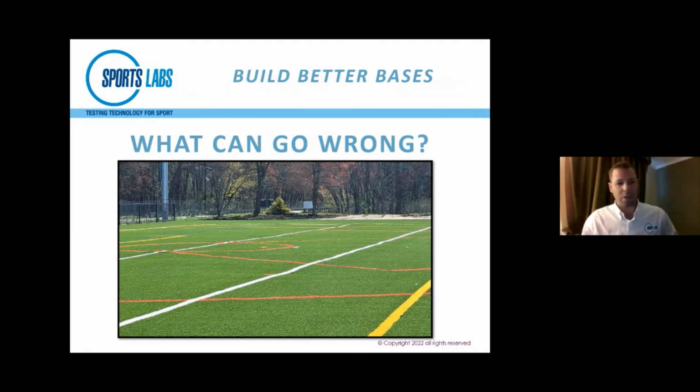Yeah, we do our best to be available at the drop of a hat. Obviously, it takes some time to make time in the schedule, but we try to be there. If you can do us a favor and give us a lead time, or just be in constant communication, it makes it a lot easier for us. So if two weeks out, you're going to be finished potentially between Wednesday and Friday of the following week, just give us a heads up and continue communicating. Then we can get you penciled in on that date.